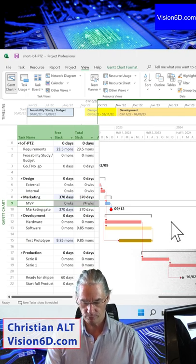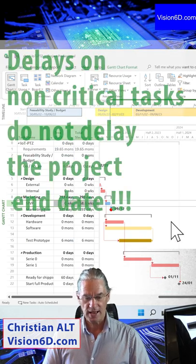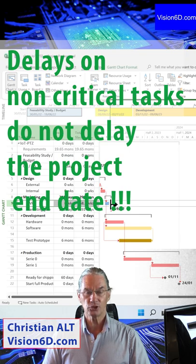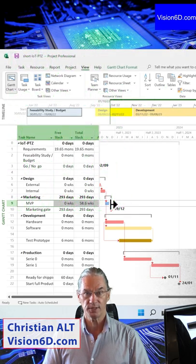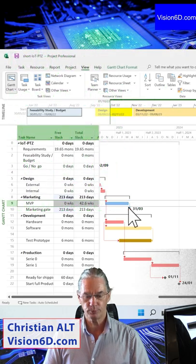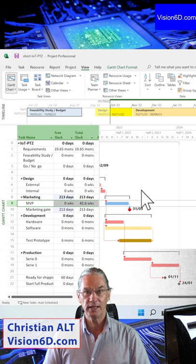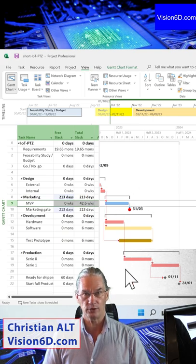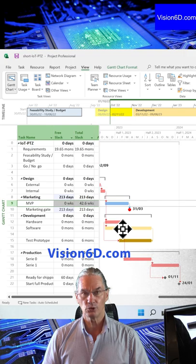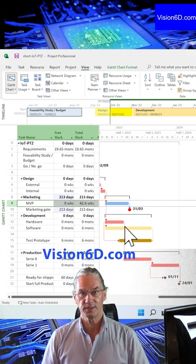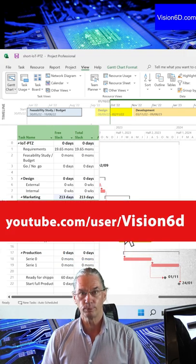If I go back now and I do it on the non-critical tasks which are the ones that are still in blue, I can prolong it and nothing is going to change in the project. It means that the red tasks are the ones that when delayed will delay all the projects.